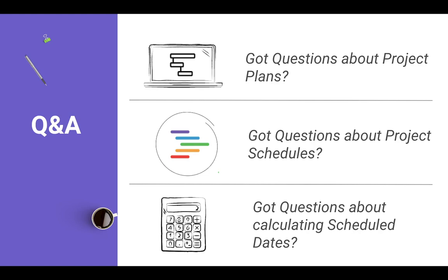Now, if you change the dates of the overall project, which is basically just the start date of the first task or milestone and the planned due date on the last task or milestone, so if you change that entire duration, then yes, all of the dates will automatically shift on that fixed schedule.